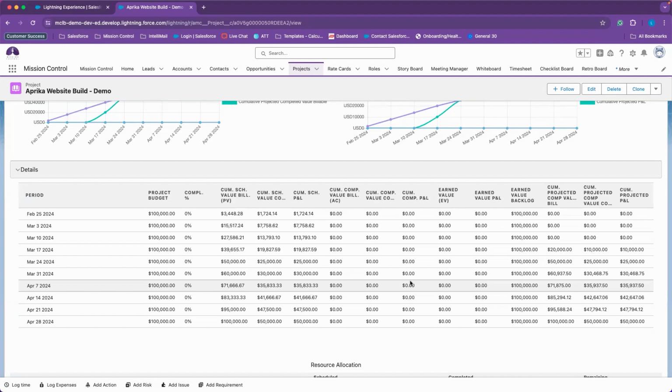If 50% of the revenue is to be recognized at the end of the month, why am I seeing a value throughout the weeks previous? So you'll see the revenue broken up across the days scheduled. This first week is appearing because it shares a few days with the first week of March. And that's why you'll see values broken up here, but it's going to be evenly distributed across the working days. So that's why you'll see that.